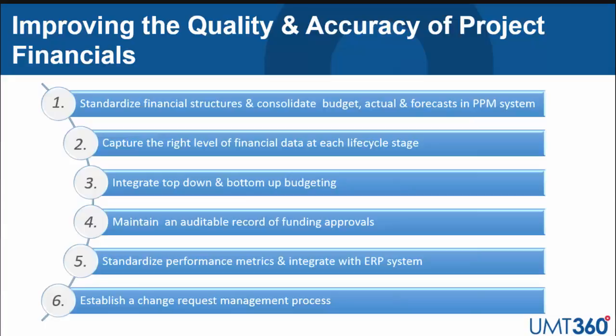Once I know the total cost of my project, once it's complete, or even the forecast cost of the projects, I can start looking at estimating accuracy across the portfolio. So I know early on in a business case, I'm plus or minus 50% accurate, within a department on average, and I can start to hedge that into my planning process. We'll talk more about that.